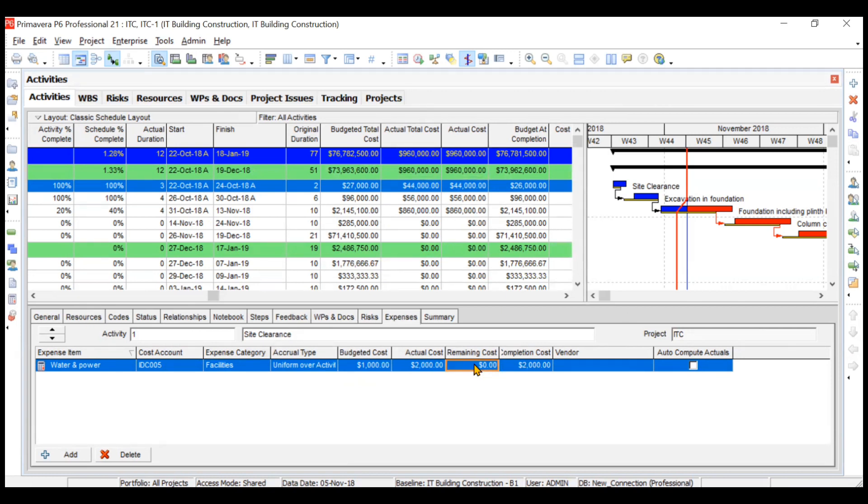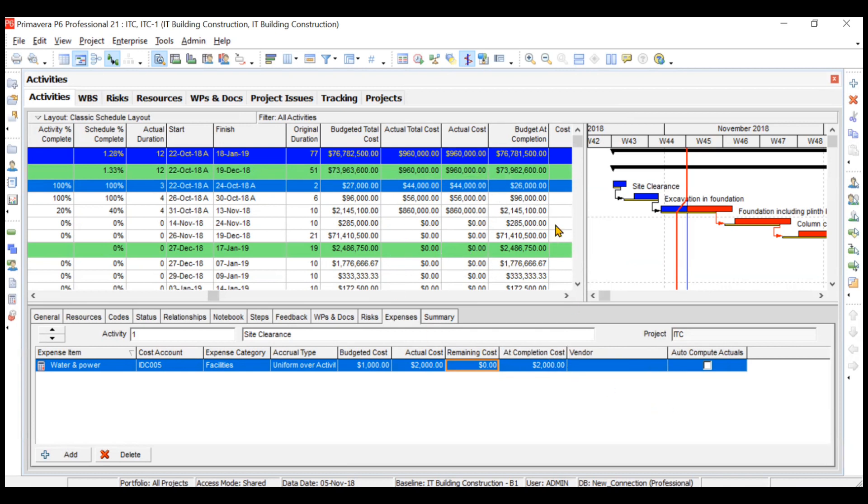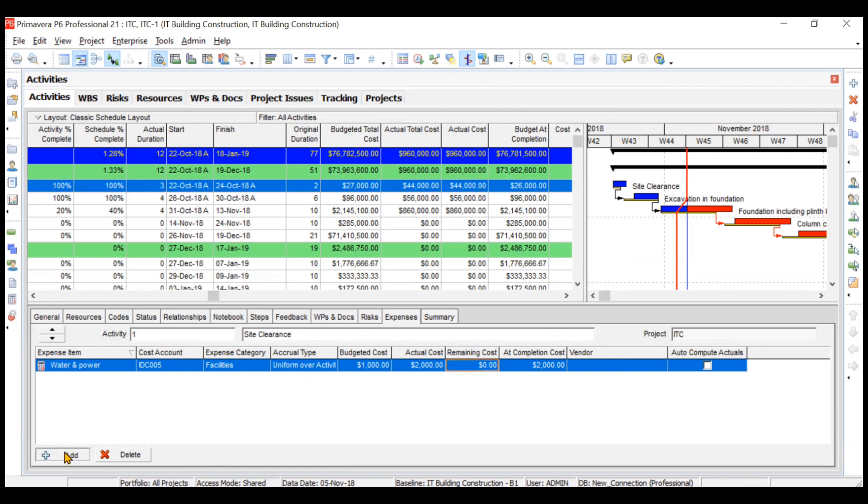Now you see this $42,000 has changed to $44,000, and the budgeted cost changed from $26,000 to $27,000 because we increased the expenses. Remaining cost is zero so it will not change. Completion cost is also $2,000. All the parameters with respect to earned value will now get changed. This is how you can add the expense.